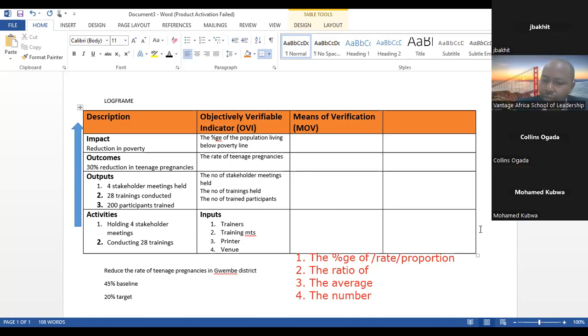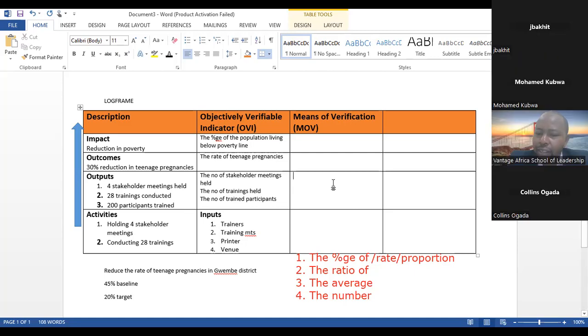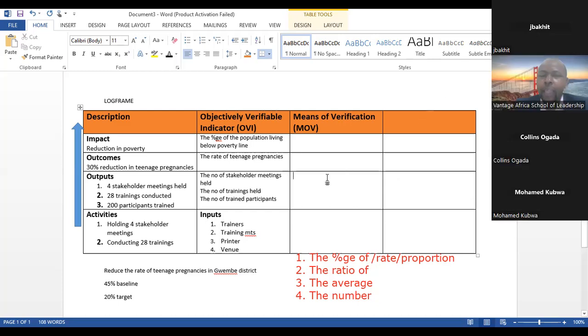One would be the report of the training. The report. We have the attendance list, the number of participants. You can back that with the pictorial evidence. And actually, in your report, you'll cover the sessions, what you are training on. Now, I will accept attendance list signed. In fact, I'm going to qualify it and say signed attendance list.